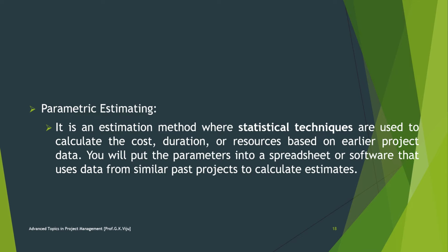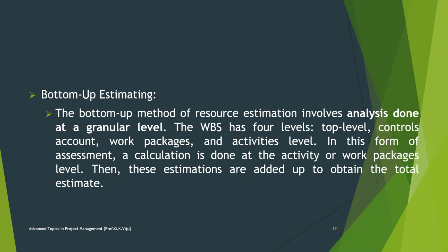This means plugging data about your project into a formula, spreadsheet, database, or computer program that comes up with an estimate. The software or formula that you use for parametric estimation is based on the database of actual durations from past projects. Bottom-up estimation.